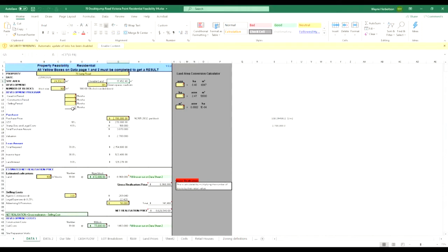So we're only going to have an 8-month build on this block, and that's where we get a lot of our costings from, right? Because you only have to put in 19 blocks into this development, and we believe we can build those in 8 months. So that's the development program. They're the parameters we set ourselves up to start the actual pricing for this particular allotment.